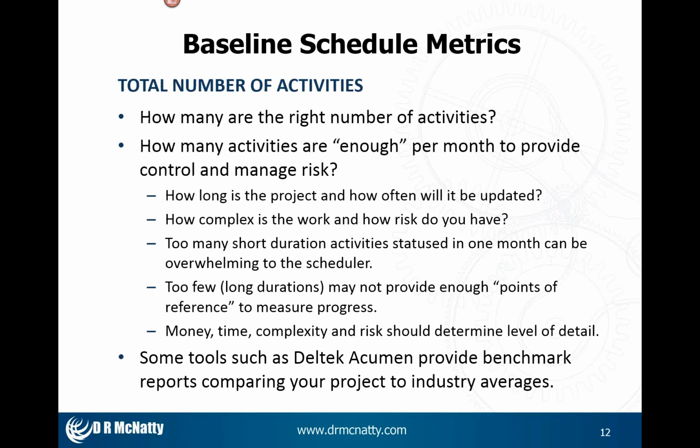How many activities do I need? Well, you need enough activities for you to be able to manage risk. Now, who are you? If I'm a contractor, on a bonded project, I might have the highest level of risk here, and so I need to have a level of detail that lets me control who does what, where, and when. If I'm an owner or a CM and I've bonded the work to a contractor, I might not need the same level of detail. And it's not uncommon to have a contractor original baseline that's used to update a construction management or an owner's original baseline. There could be two baselines on a schedule.